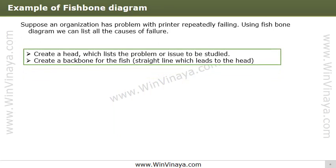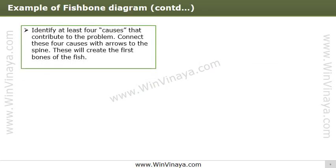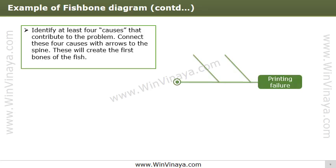Let's take an example to understand the fishbone diagram better. Suppose an organization has a problem with printing which repeatedly fails. We'll examine this by brainstorming all possible causes and using a fishbone diagram to arrive at the root cause. Begin by creating a head listing the problem, then draw the backbone — a straight line leading to the head. Identify at least three or four causes that contribute to the problem and connect them with arrows to the spine.